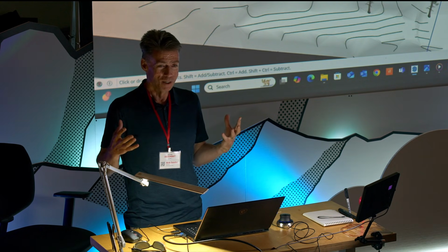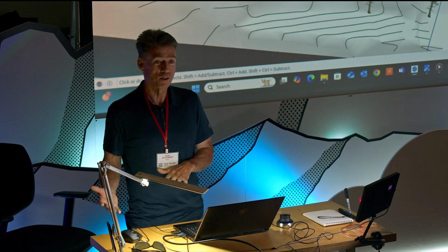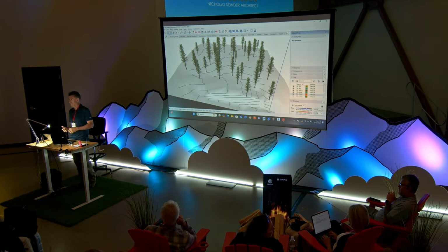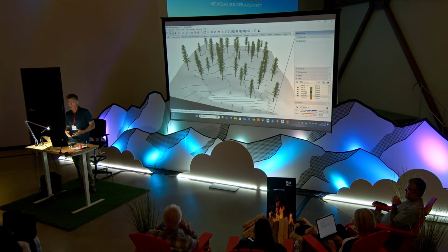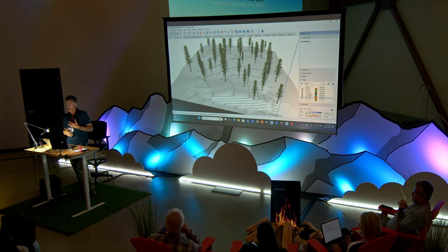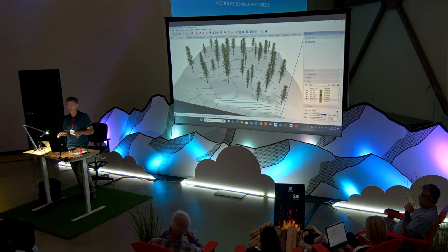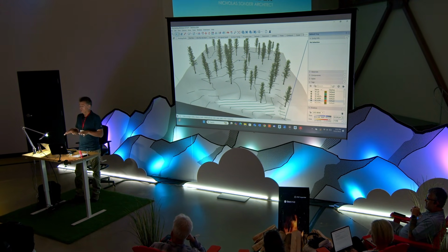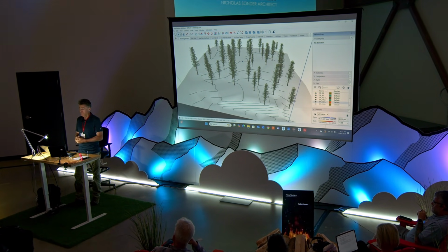And, you know, these are details a lot of architects actually don't think about early on and tend to cause problems later in design, or worse, during construction when it's the most expensive. So I try to balance all of these things with the more fun aspects of design, where I start to control what the window fenestration will be, the organization of the spaces in a little bit more detail. Am I going to have some oblique angles on the home in order for it to fit on the site based on the size of the home they want?